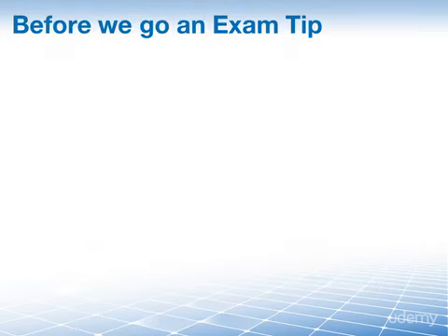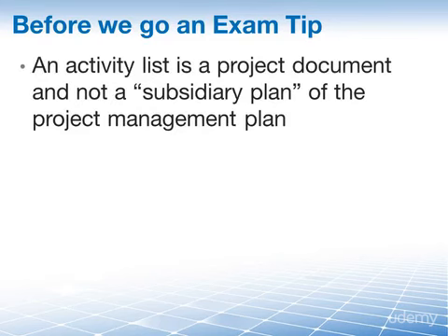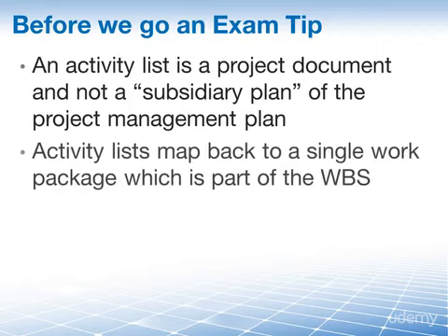And here's the promised exam tip, or rather tips, things about the activity list to remember for the exam. First of all, the activity list is not a plan at all, and therefore it's not a subsidiary plan of your project management plan. Instead, it is simply a project document. Something else is important to remember about the activity list, and that it's just an addition to the WBS. It is not part of the WBS itself.